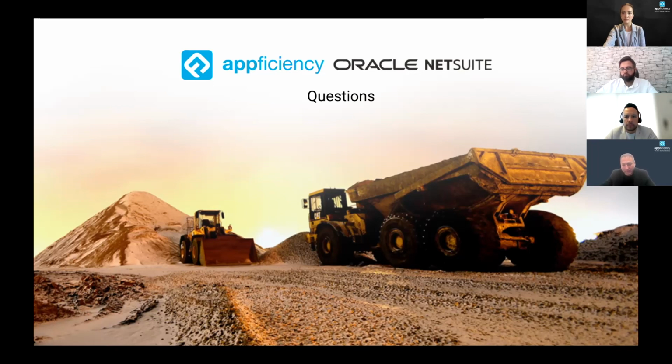And then the third method that we usually use for scheduling is your percent completion based on the duration of the work. So this work's supposed to take 10 days. We spend 5 days, so we should be at 50%. The other thing that I would also add here is that we need to always consider the type of contract. So if you have a cost plus contract, you definitely want to rely on the cost. And if you have a fixed price contract, you definitely want to rely on your physical percent completion, because cost is not relevant. You don't even share the cost with your customer. That's what I wanted to add here.